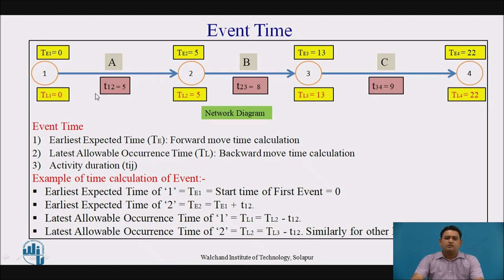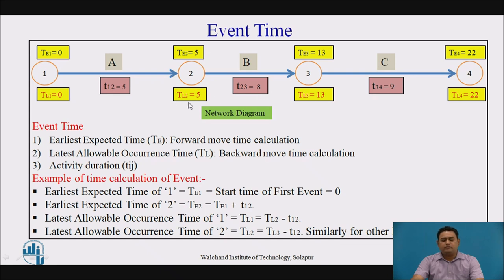For the time calculation moving left to right: 0 + 5 = 5, 5 + 8 = 13, 13 + 9 = 22. Similarly, moving right to left: 22 − 9 = 13, 13 − 8 = 5, 5 − 5 = 0. These are the event times for the network.